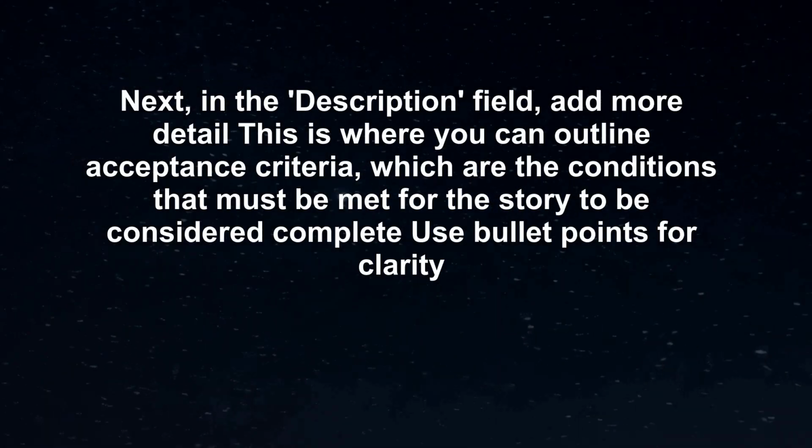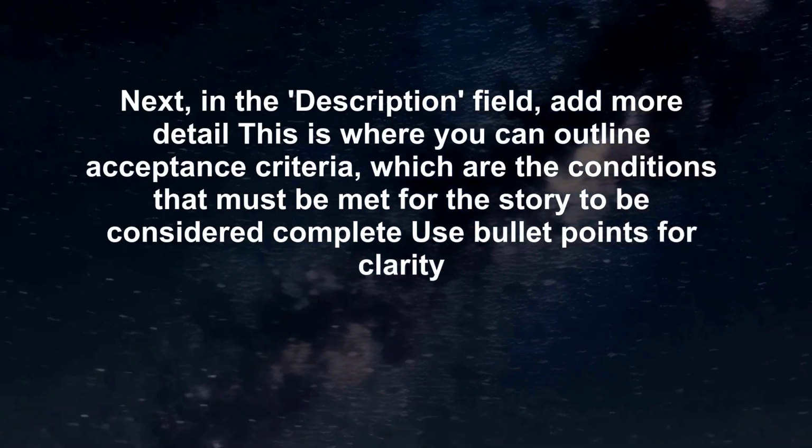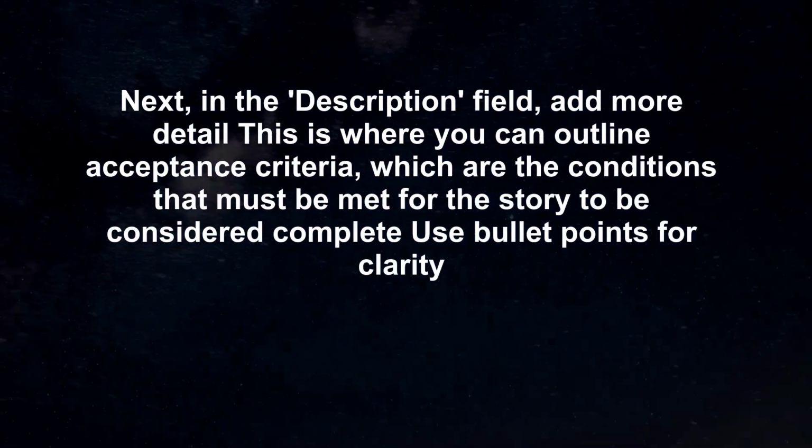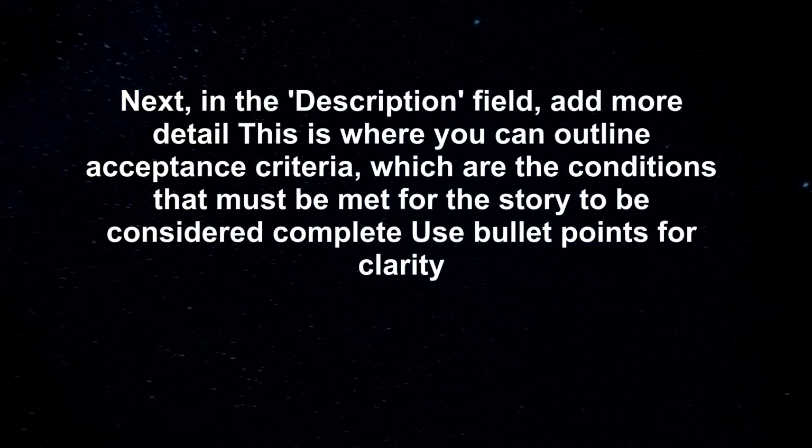Next, in the Description field, add more detail. This is where you can outline acceptance criteria, which are the conditions that must be met for the story to be considered complete. Use bullet points for clarity.